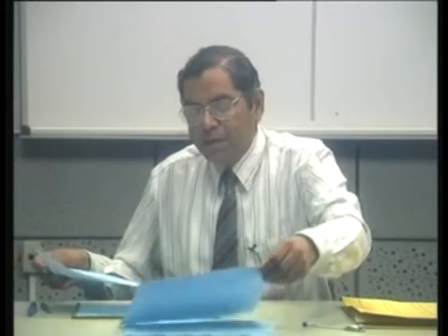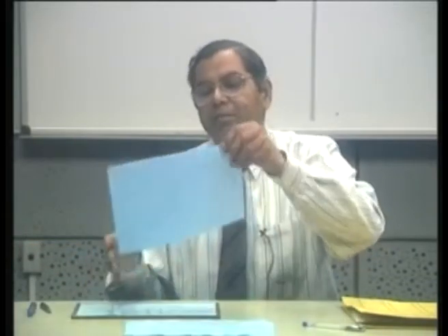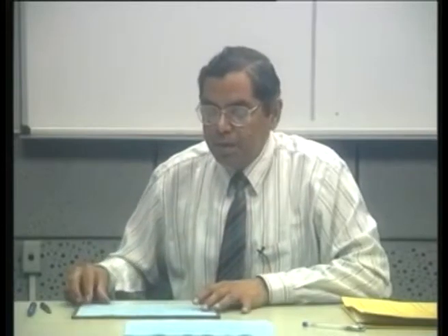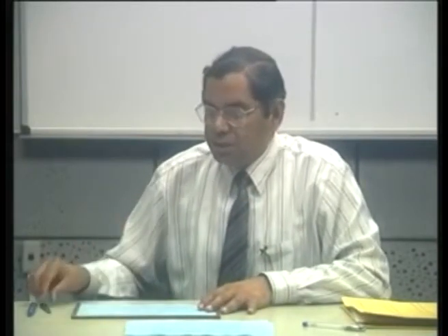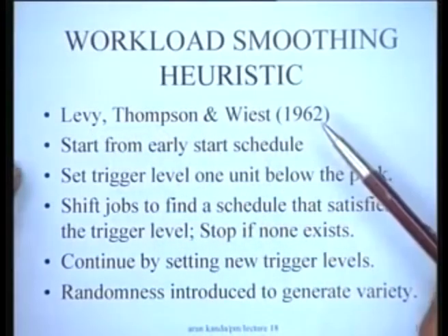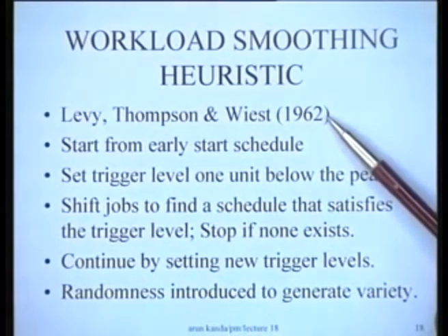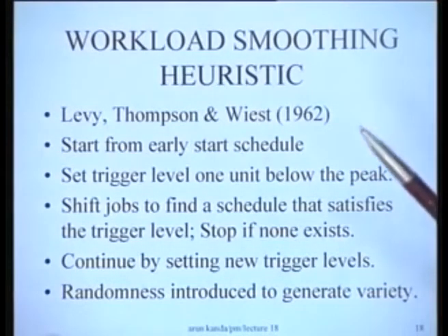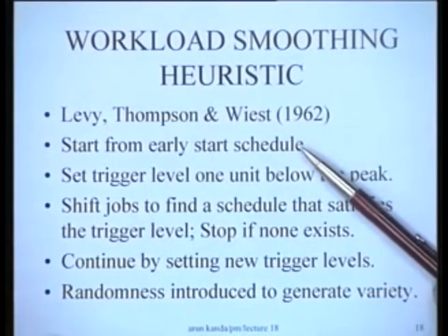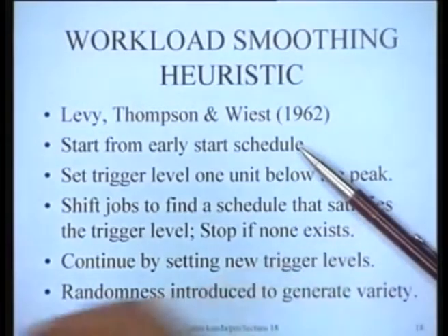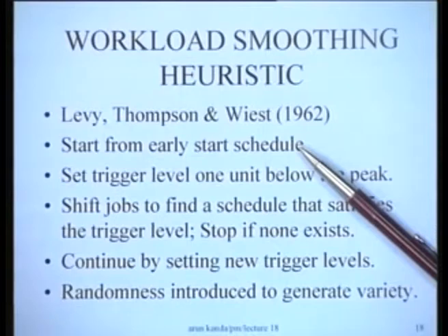So broadly speaking, let's see the logic of the workload smoothing heuristic due to Levy, Thompson and Wiest, which was proposed very early and which has been patronized by Wiest. The basic procedure can be described very simply. You start from an early start schedule, as we do earlier.